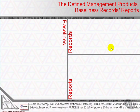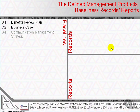there will be the PRINCE2 management products required to exercise project control through the use of PRINCE2's 40 activities. 26 of the products are given templates in Appendix A. Others, such as role descriptions and follow-on action recommendations, or the project mandate, are named and discussed but not defined in Appendix A. The 26 templates fall into three broad categories: Baselines, Records and Reports.